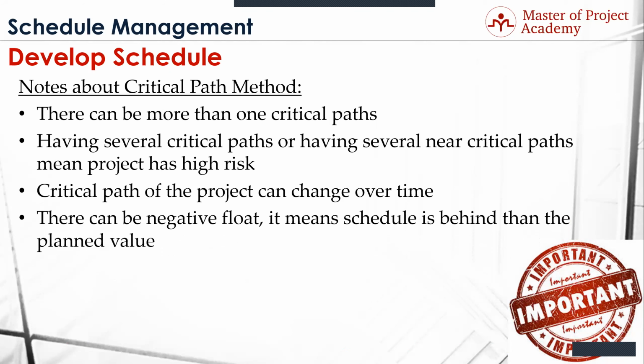Let's say you have a 20-day project. You planned it out. You have a beautiful network diagram. You worked your butt off, and 20 days is what it's going to finish. And your boss comes up and says, yeah, that's real great, but you got to finish it in 15 days. Well, you now have a negative float of 5 days. You got to make that up somehow. How would you make up a float of 5 days?